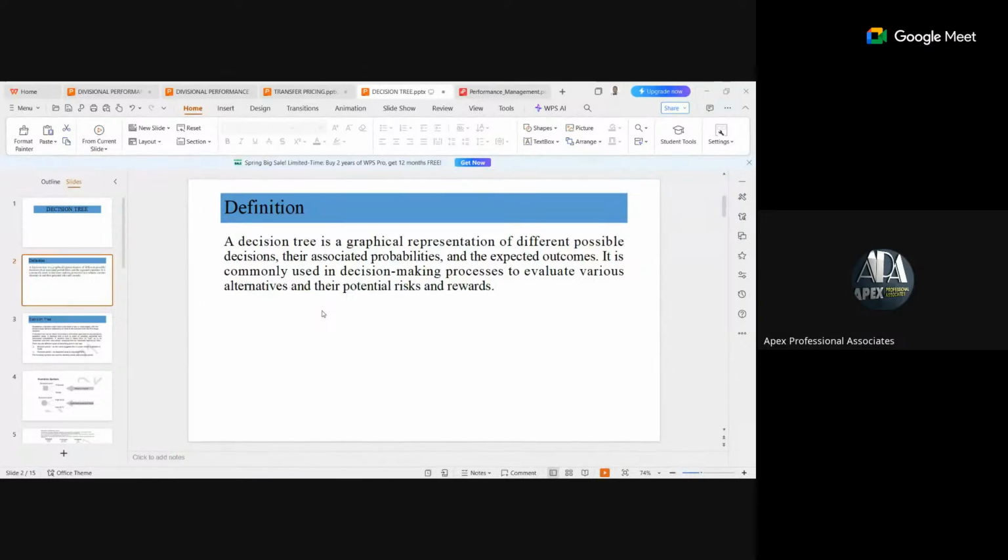Now, once you've done all these, you can now determine your expected value from your decision tree. At this point, you walk back to your first point of decision to see which decision you should make. Should I invest or should I not invest? So the whole essence of decision tree is that it still boils down to calculating expected value to be able to make an informed decision.